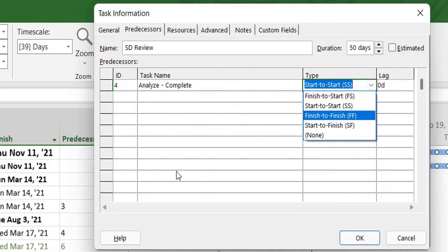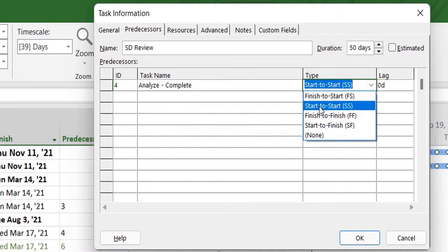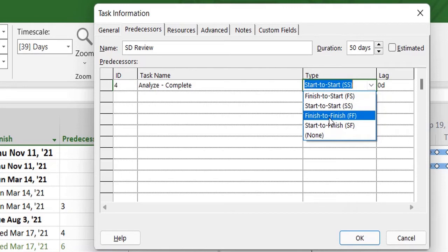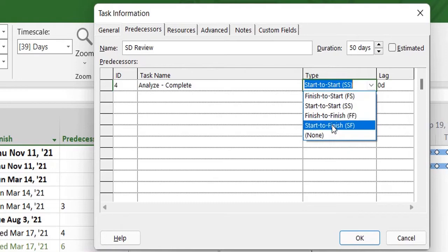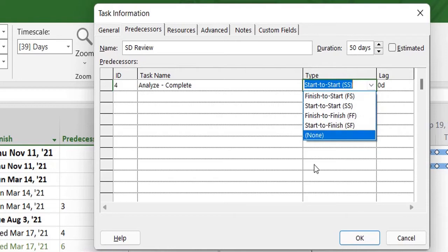Third is finish-to-finish, which means task number 8 will finish alongside task number 4. And last but not least is start-to-finish, which means task 4 will start once task number 8 finishes. So it's a reverse of finish-to-start.